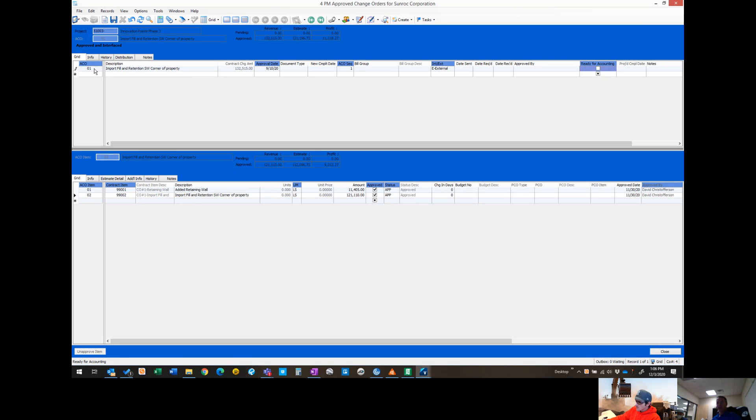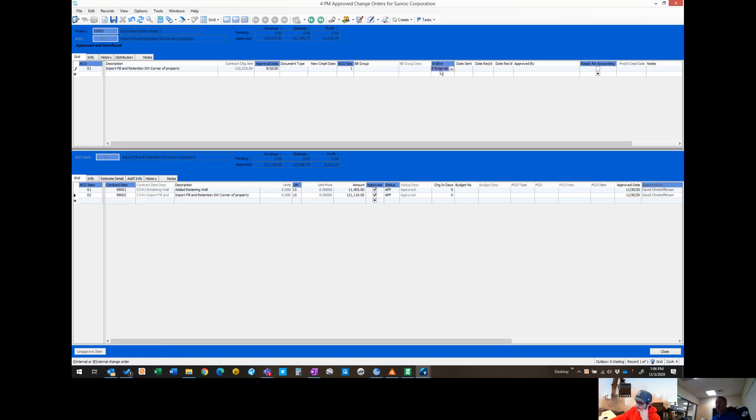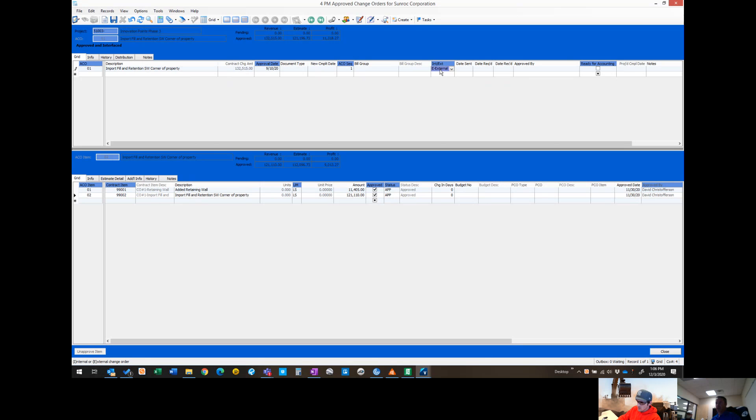He's got a change order from the owner that he's entered. Because it's with the owner, it's an external change order because we're getting paid. If you have a subcontractor that you're doing a change order for but the owner's not paying you, you're not getting reimbursed, or it's not associated with a change order to the owner, then it would be an internal change order.